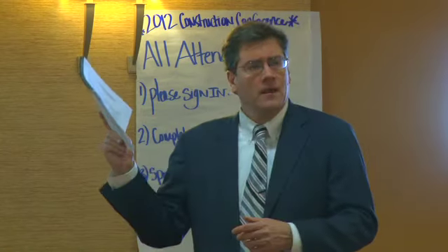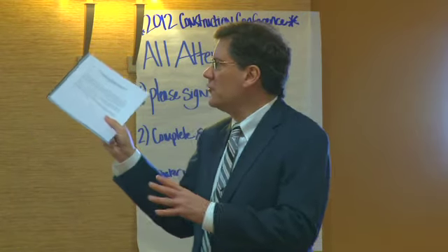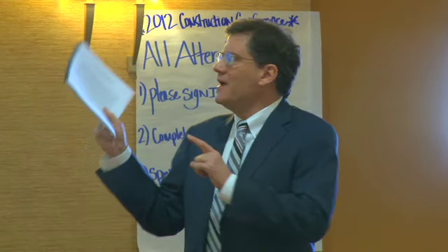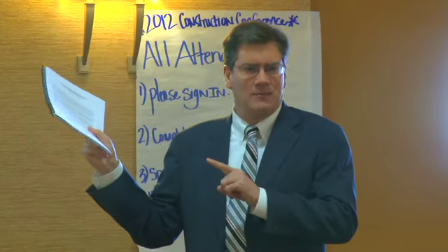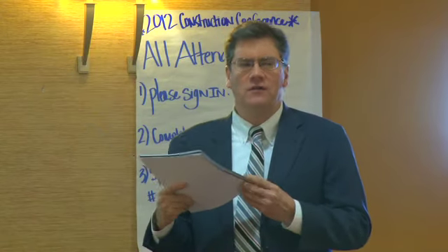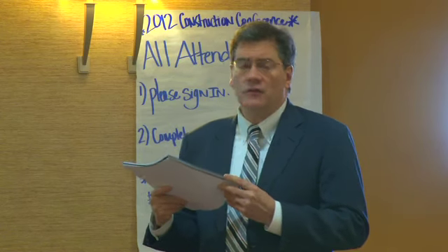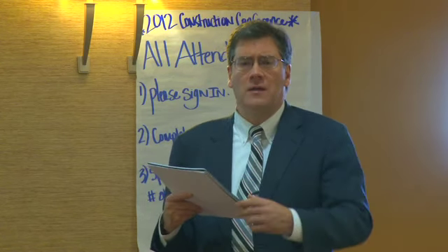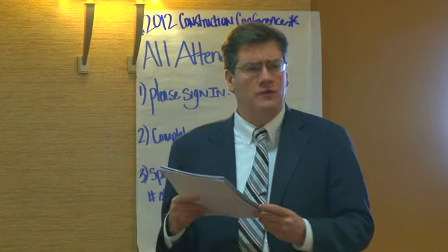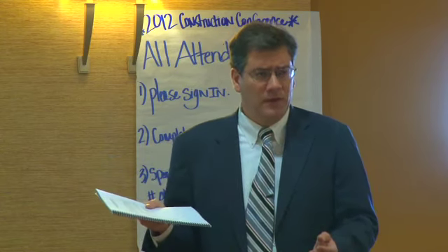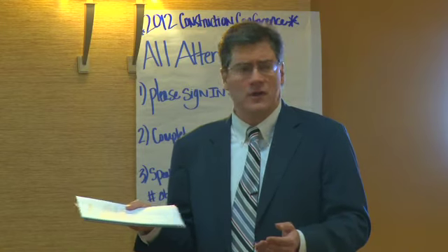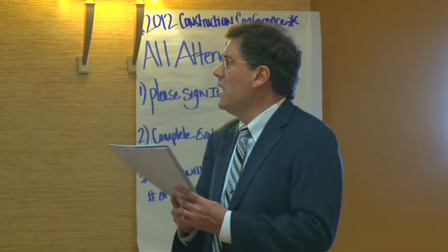Now, the legislature issued these releases. You do not have to sign a release that is exactly the same as what appears by statute. And a lot of GCs and owners don't realize that. It just means that it's not going to get the automatic stamp from the judge saying, okay, this complies with the statute, because you exactly copied it. You can do your own release. It just has to stand on its own as a contract of waiver and release.